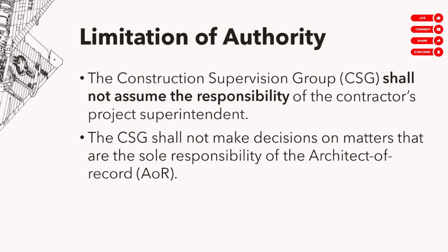Okay, again, the CSG, the full-time supervisor, does not work as the superintendent of the contractor. The contractor must have his own superintendent, his own QAQC, his own PIC. Basically. Okay? So, hindi pwedeng sabihin na, mali yung ginawa ng mga trabahador ko kasi hindi in-inspect ng CSG yung bakal bago buksan. Okay? With or without the full-time supervisor, dapat tama yung gawa ng contractor. The CSG is not there to ensure na tama yung gagawin ng contractor. The CSG is there kasi kailangan may mata si owner sa site. So parang eyes of the owner siya, si CSG. Pero with or without the CSG, the contractor should get it right.